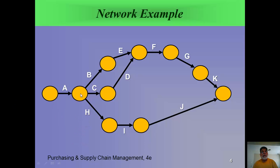Before you do C and before you do B, you have to do A. What we would do with this network is determine the amount of time it takes to do each activity and figure out which is the critical path — in other words, if something goes wrong in one of the activities, how much will it increase the total time of the project?